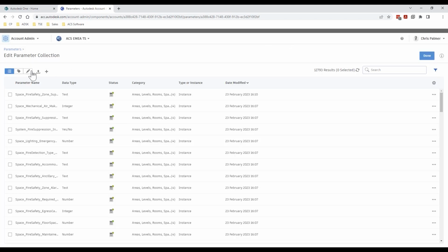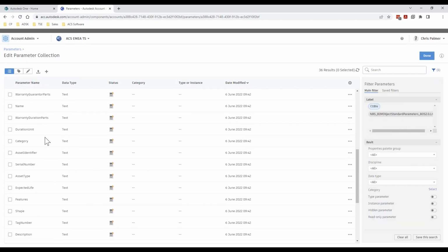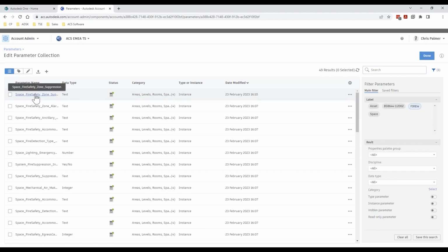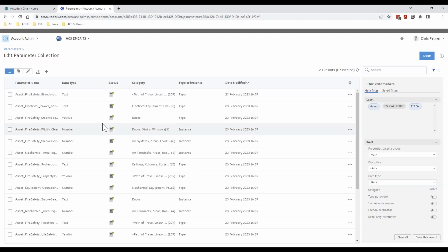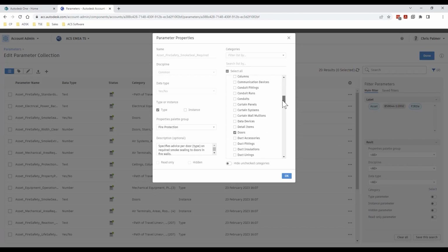data requirements across projects. The service will enable you to create collections of parameters to be used across different projects, helping you to communicate project data requirements with subconsultants and suppliers, and ensuring the information you are receiving in models at the outset of your project is helping you to achieve your data handover requirements such as COBie and FireIE